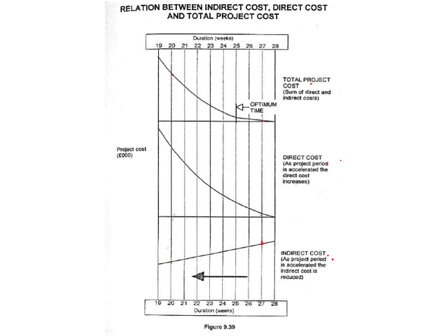Your indirect cost has a constant slope. That's like your P's and G's, your daily or your monthly costs. Your direct cost is your more plant, like we highlighted earlier, which escalates if you reduce the time needed. So that is basically the concept. We're going to look at that now, and then try and plot this on a graph.